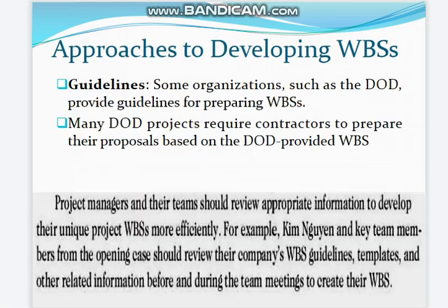Next, guidelines. What is guidelines? Some organizations such as the DoD provide guidelines for preparing WBS. Many DoD projects require contractors to prepare their proposals based on the DoD provided WBS. Project managers and their teams should review appropriate information to develop their unique project's WBS more efficiently.